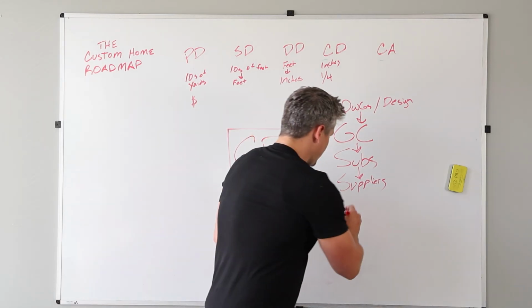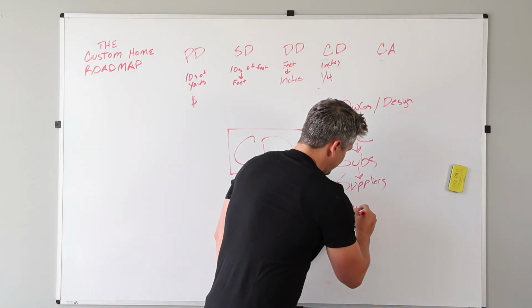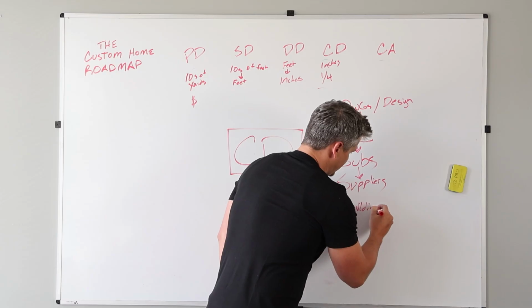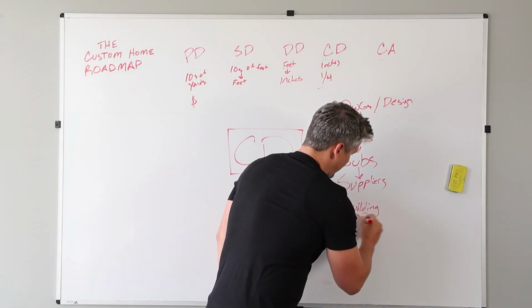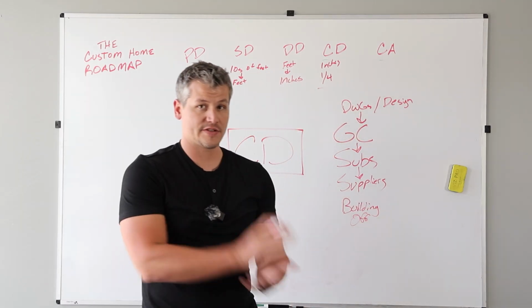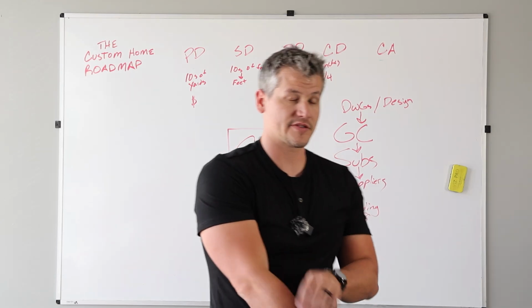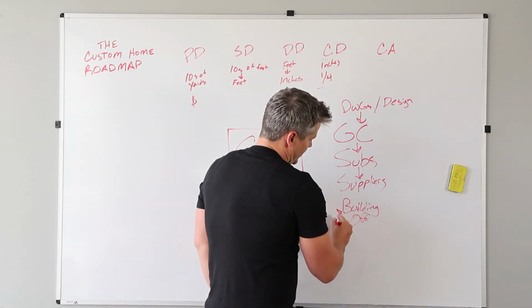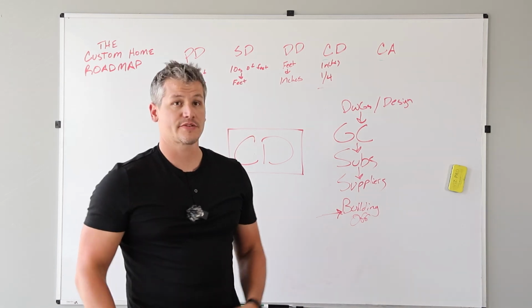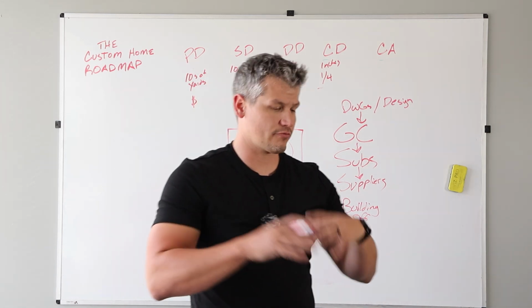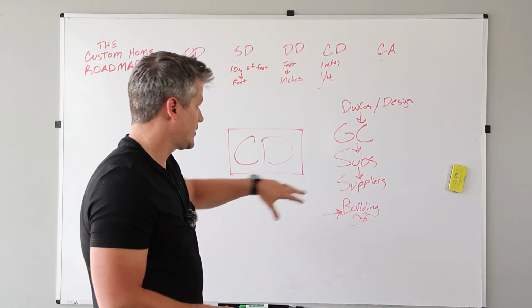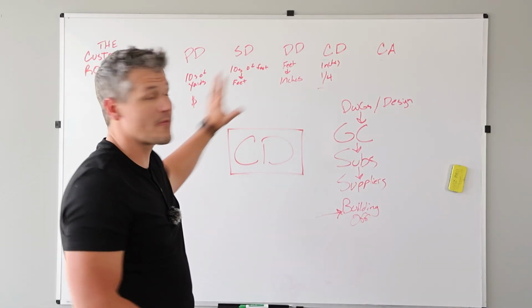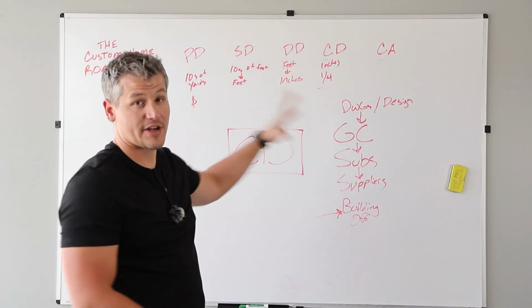The other person that we're going to be communicating to is the building officials, the people that are actually going to give us the permits. They need to know, is this building actually complying with building code? Is it complying with zoning? All those drawings get submitted to the permit office for permitting. So it's really important to be able to communicate, through a really good set of drawings, all of this information that we've spent so much time gathering and designing.